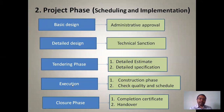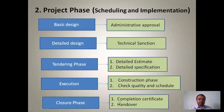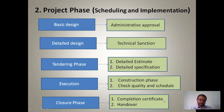The last part of the second phase is the closure phase. Here the project is completed and you have to obtain a completion certificate. Only after getting the completion certificate can you technically say the project is over. After completion, the project is handed over — for example, a contractor who has constructed an apartment gets the completion certificate and then hands over all the flats to their respective owners. This handover phase is the last part of the project phase.